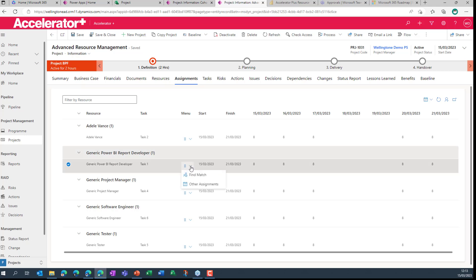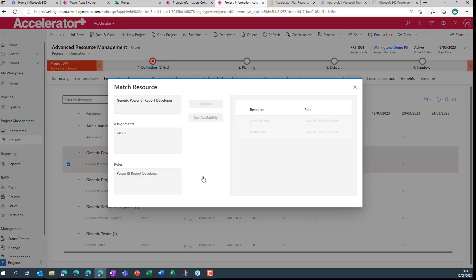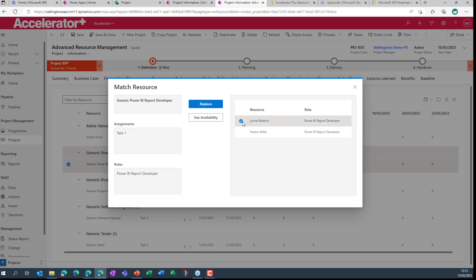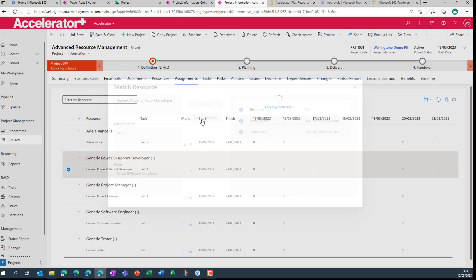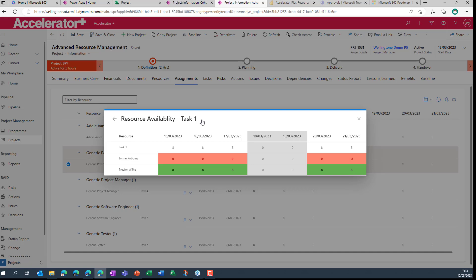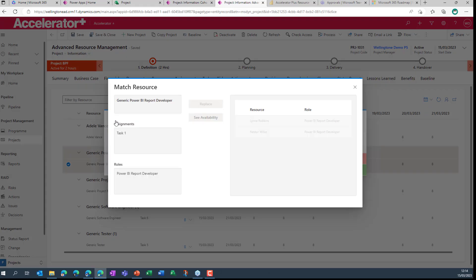So in order to do that, I'll click on this arrow and I will find a match. And for those of you that might be familiar with Microsoft Project Online, used to the enterprise resource capability that was available there, this is almost a direct replica of that functionality. But here now, I see two resources that can fulfill the role of a Power BI report developer. I'm going to select both and I'm going to see their availability. So Nestor is sitting around doing pretty much nothing, according to this, whereas Lynn is pretty busy. So the obvious choice for this project is going to be Nestor.